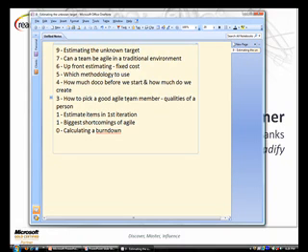And obviously the more nebulous ones, like I want the ESP interface where I just think about things to be done and the system just does it for me, you estimate with a really large point size. So that way you've got these big chunky items way out the end, but the customer knows there's also a massive amount of uncertainty in that, and you can progress from there. I don't know if I'm answering the question quite right. So, clarification?